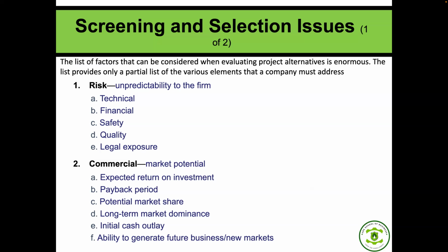Then also the issue of payback period. We will look at this in detail later on. Payback period basically refers to a financial model where, if you are investing in a project, it is the number of years it is going to take you to recover or recoup whatever you are investing. Yes, recoup your investment. Usually we say that the lower the payback period, the better the investment.